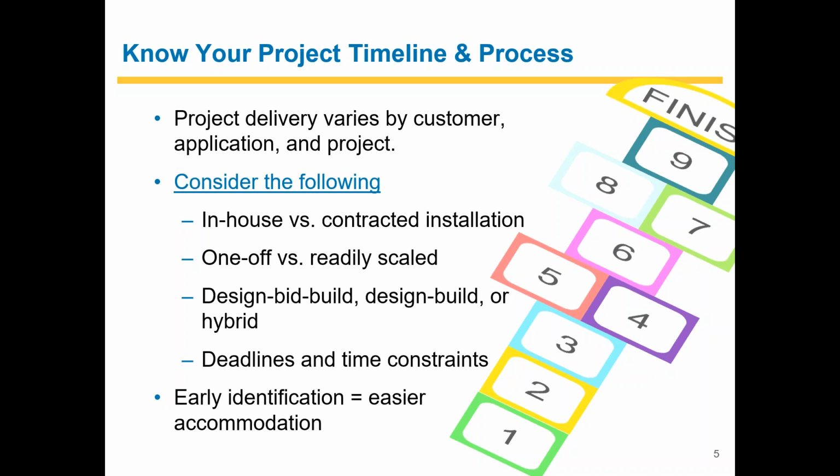And of course, deliverables and time constraints. I do a lot of work with school districts, and we are generally confined to 3-month windows during the summer when everybody's off school for doing our retrofits. So when that's a project constraint, we have to keep that in mind when we're designing the entire project to make sure that what we're delivering can actually be fully executed from that last day when the bell rings through basically the week before school starts and the teachers get on site to start prepping for the new year.